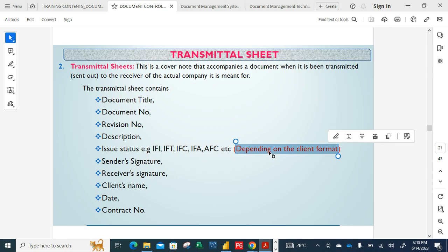So if you are sending any document out with a transmitter number, they also will register it in their MDR. So in case there's any issue, they'll be able to cross-check to see if everything is synchronized, if what you have is the same thing with what they have. So as you push a document out, they register it, they have the same transmitter sheet, the same document master document register that you have.